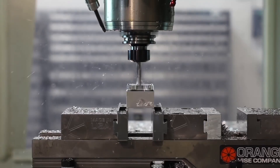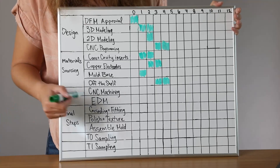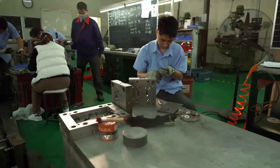The next step is to CNC machine the mold. Roughing and finishing passes can be done within the same machine. When CNC machines were more expensive and less precise, parts were often roughly machined in one machine, then moved to another to do the finishing pass. Now that CNC machines are more precise and less expensive, all the machining can be done in one machine, which saves a lot of time. Other components like the lifters, sliders, inserts, and copper electrodes are also CNC machined, and any necessary adjustments are made to the mold base. Overall, CNC machining the mold and other parts will take three days.